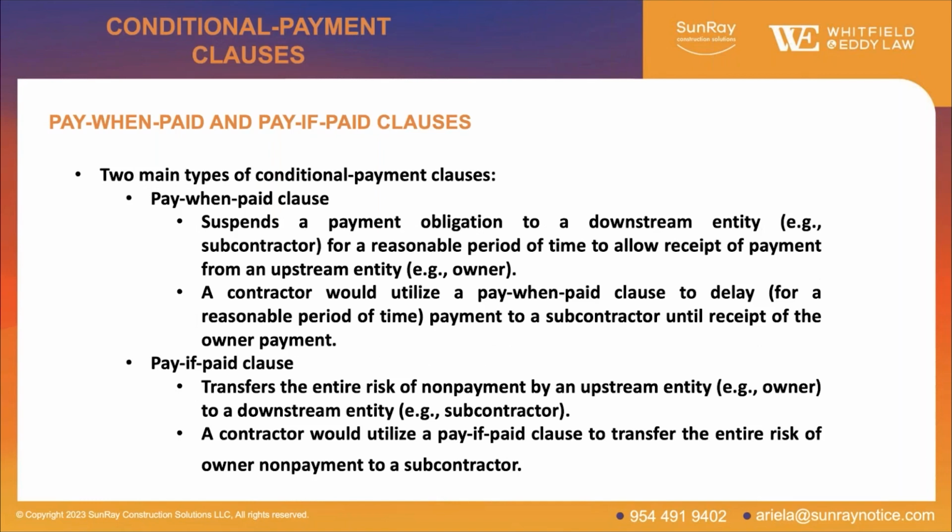So the next one I alluded to earlier are conditional payment clauses. And these are very important to contractors and subcontractors. There's two main types: pay when paid clauses and pay if paid clauses, and they're different, but they're both within the umbrella of conditional payment clauses. The first one, the pay when paid clause, it suspends a payment obligation downstream, for example, to a subcontractor for a reasonable period of time to allow receipt of payment from an upstream entity like the owner.